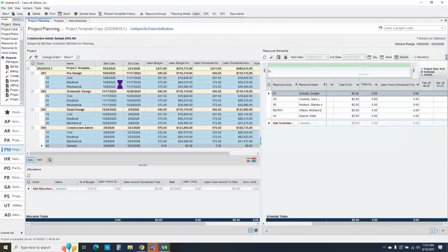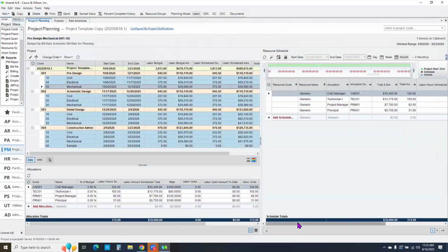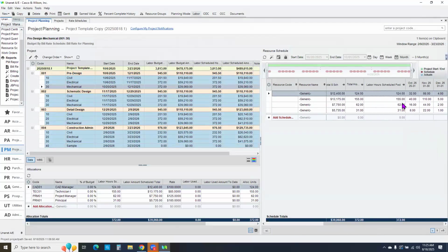And so if we come down and, yep, it refreshes over. So it now shows on the 20th. And if I just focus in on that, if I switch to the day view, you can see it actually starts here on October 20th. So it moved all the hours I had starting on October 6th forward. So you just need to be cautious. Moving forward is fine. Backwards, the system doesn't know how to move the hours backwards. Great question.